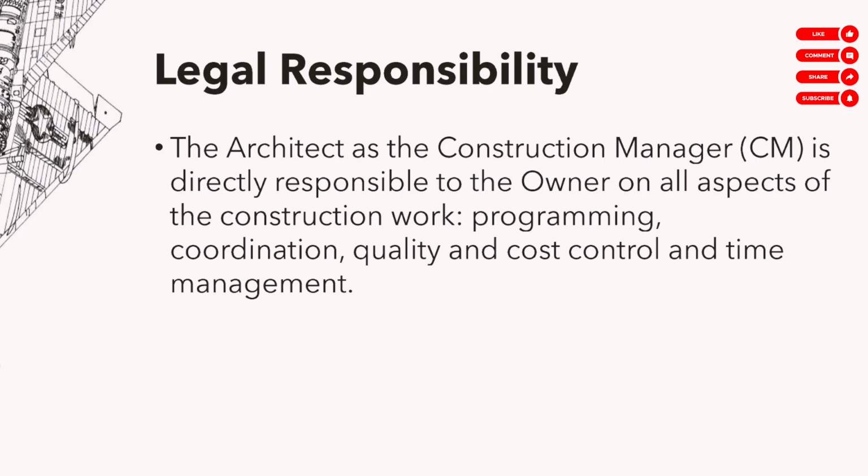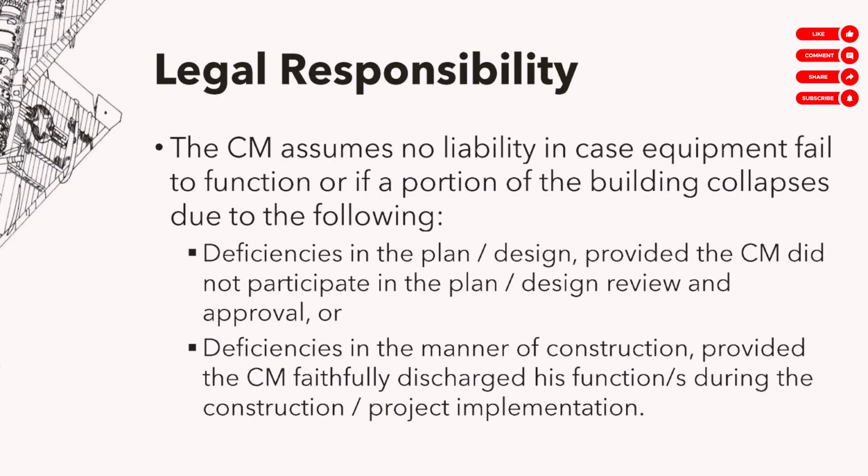The architect na naging CM, again, we're assuming the architect is the CM, is responsible to the owner on all aspects of the construction work: programming, coordination, quality, cost control, time management. The CM should not assume any liability kapag nag-collapse yung building due to the following. Okay? Nag-collapse yung building due to deficiencies in the design, provided na hindi siya kasali sa plan review or sa design review and approval. Or nag-collapse yung building due to construction, provided na ginawa naman niya yung trabaho niya during construction.